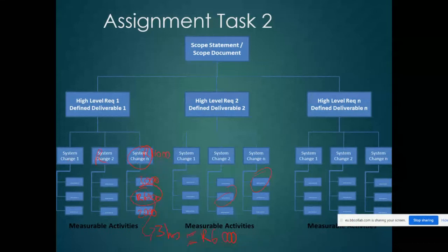And if we have a cost for this one and a cost for this one, we can add those all up and get a summary cost for this item here. And so you add all of those up. You see why the work breakdown structure is important? Because at the detailed level, you put in your detail at each little task you have to do, and that makes it incredibly easy just to sum this all up. And the software does it, by the way. If you're using decent software, I'm not saying doing it manually like the way most of you guys are doing it, it wouldn't add it up automatically.